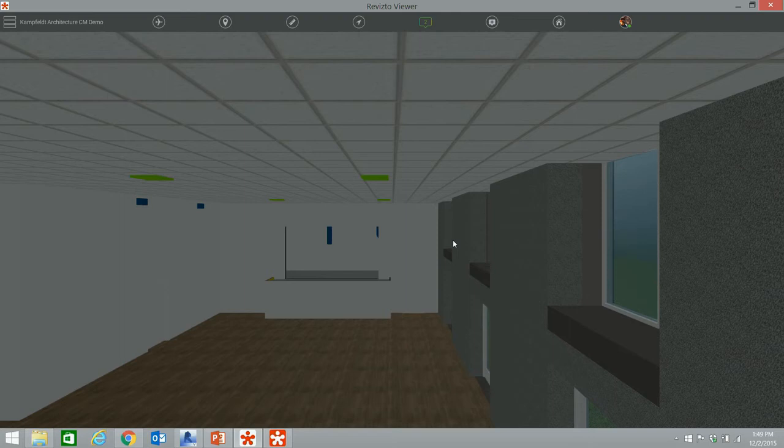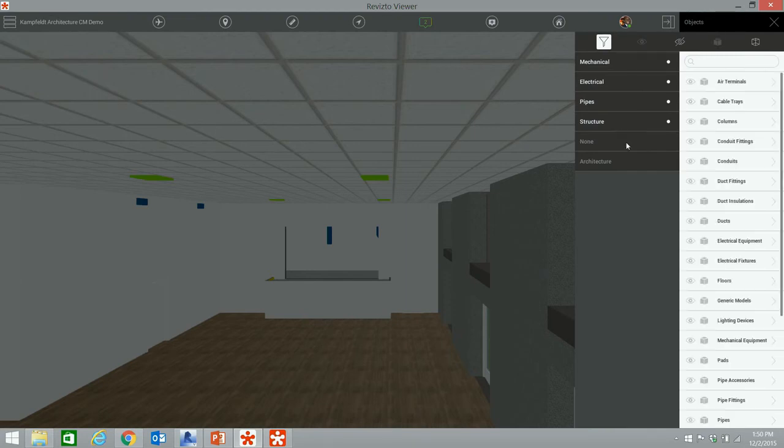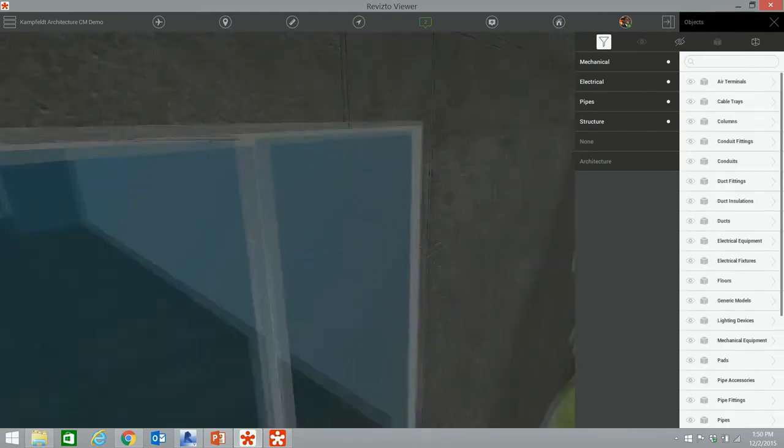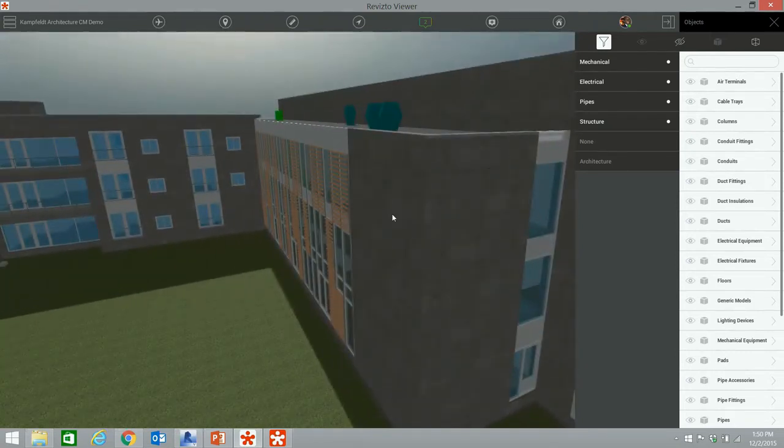Yeah. One of my clients, I won't say the name, has a project of I think 90 models and 30 buildings. The way they set it up, and the way we set up the entire project here, is that we set up the different buildings as different projects. They have a master plan which shows the entire campus of where these buildings are. So if they want to do a fly-through and get an idea of the spacing between the buildings, they can go into that. But they're not heavily loading it, because the iPads can't handle 90 different models.